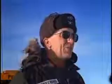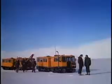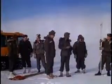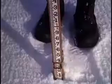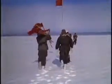Colonel Kirkering, commanding officer of the United States Army Polar Research and Development Center, was with me when we made the final reconnaissance. We needed a flat surface, a level with less than 1 degree of slope. This would minimize construction problems by enabling us to keep all of our tunnels on the same level. We finally picked this plateau, a smooth white plain of ice for as far as you could see. This was the closest location to Thule, our supply base, which would not be affected by the summer thaw. That first day, we set out flags marking the boundaries of the camp.